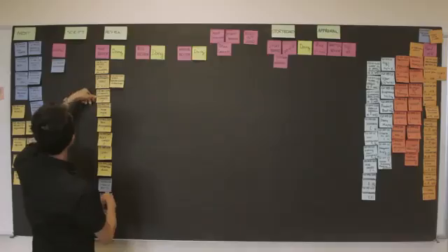Before we end, I want to talk about one last thing. How do you know when to start a piece of work? In Scrum, this was done by planning during the sprint planning meeting. In Kanban, it's different. There are no planning meetings. Because work marches along at its own pace, needed work is constantly being taken from the top of the product backlog. So long as the requirements are always prioritized properly, the product will naturally be built in order of feature priority. The Kanban equivalent to Scrum's product owner ensures that the product backlog is always in proper order, so when the next piece of work is pulled from the backlog, it's ready to go.